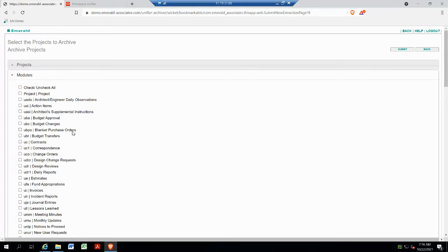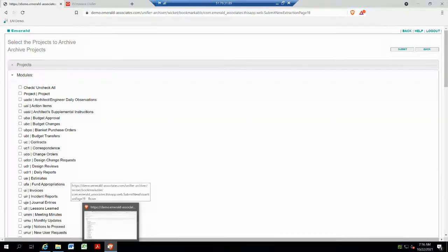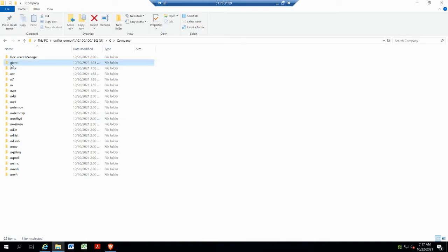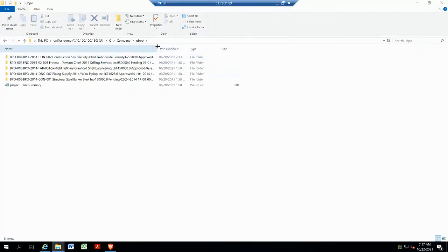They could also be bulk items that you buy en masse, and then you distribute it out to your project sites. Okay, things like structural steel or specialty equipment that makes sense to buy many of them and then distribute it to the projects and have basically the projects refund you. Okay. So that's an example of what's going to be sitting inside of that module. So blanket purchase orders.